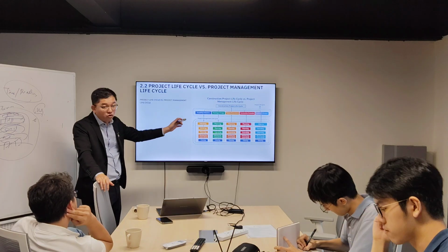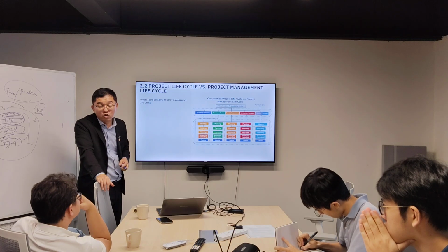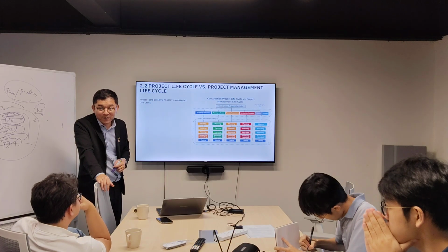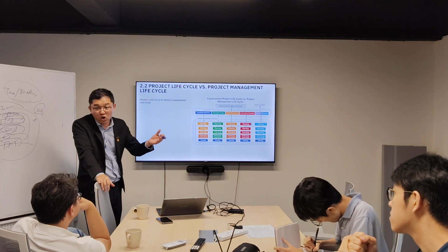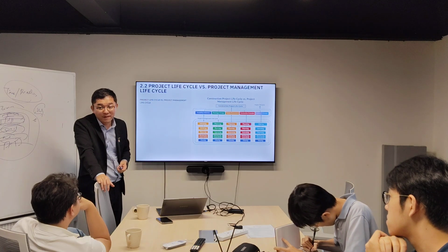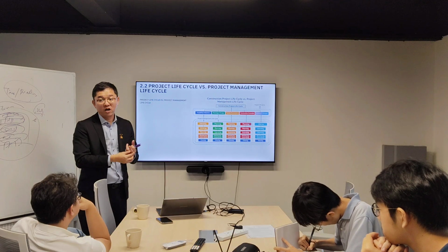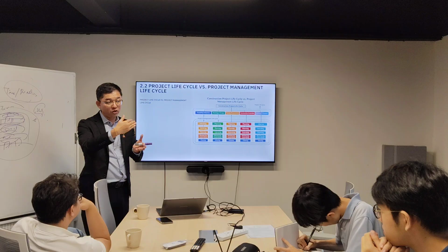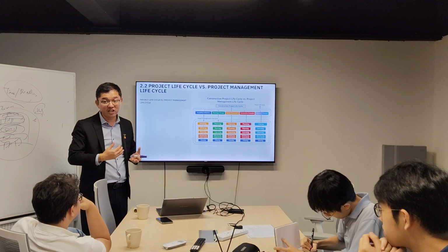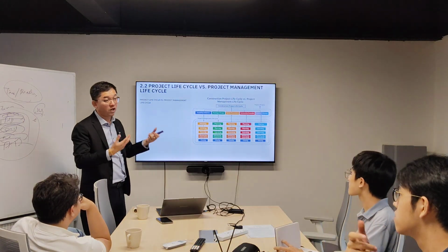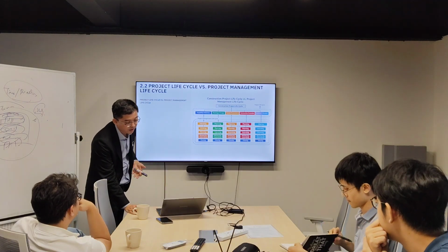Then during the construction, also the same process. During the handover, also the same process. You need to know who is your owner. Let's say you are constructing a factory project, right? Your owner is an operation team. Okay, then you need to tell him the manual for your machinery, how you take care, what the so-called maintenance period is, and how you operate this. You need to tell him, also with the manual from your consultant or from your contractor.